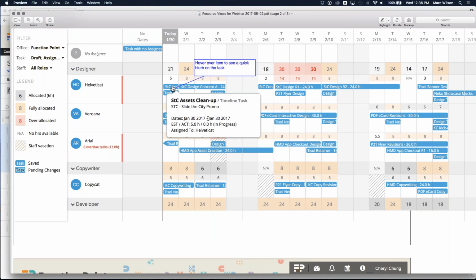Depending on how you assign your tasks, how that time evens out across all the days might end up being a very small amount of time on each day. But I believe that is the goal, is having that evenly allocate the time across all of the days that the task is spanning, as opposed to end loading it and then pulling the time back, which is what the system is currently doing. Am I correct in my descriptions there?